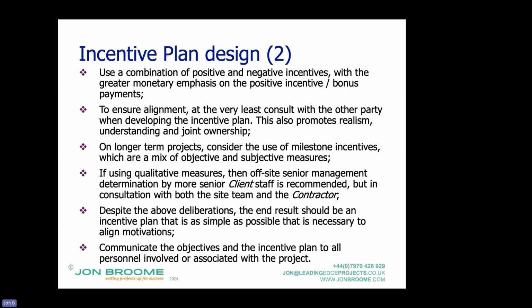Going back to the top one, use a combination of positive and negative incentives. In fact, other research indicated that negative incentives, damages, if anything, have a negative effect on project performance. And I won't give my research, I'll give a conversation I was having about a month ago with someone. And on this point, he absolutely agreed.